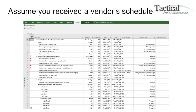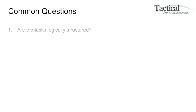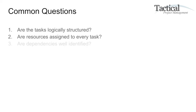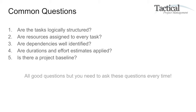So let's assume you received a vendor's project schedule. What's the overall schedule quality? It's hard to tell just by looking at it. Some common questions that emerge: Are the tasks logically structured? Are the resources assigned to every task? Are the dependencies well identified? Are durations and effort estimates applied? Is there a project baseline? All good questions, but you need to ask these questions every single time — manually.